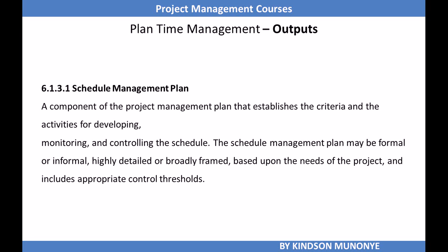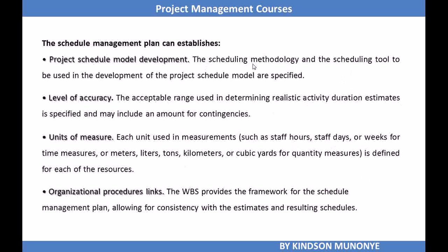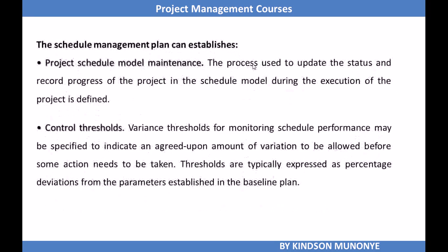The schedule management plan is a component of the project management plan and establishes the criteria and activities for developing, monitoring, and controlling the schedule. The schedule management plan may be formal or informal, highly detailed or broadly framed based on the needs of the project, and include appropriate control thresholds. The schedule management plan can establish project schedule model development, level of accuracy, units of measure, organizational procedures links, and also project schedule model maintenance.